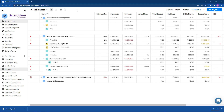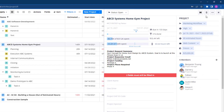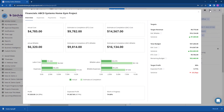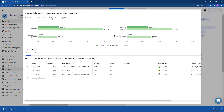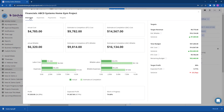BirdView also supports project financial tracking. Go to project details and click the dollar sign icon at the top right to view and set project planned expenses, record scheduled payments, or get an overview of all current expenses — including estimated actual cost and billable amounts in real time.